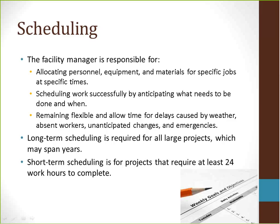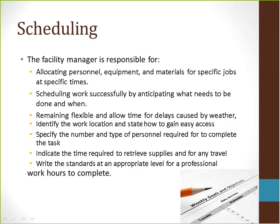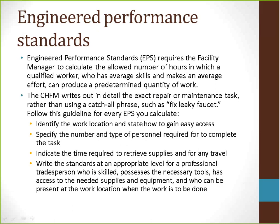Long-term scheduling is required for all large projects, which may span over a period of many years. Short-term scheduling is for projects that require at least 24 hours to complete. Engineered performance standards, or EPSs, require the facility manager to calculate the allowed number of hours in which a qualified worker who has average skills and makes an average effort can produce a predetermined quantity of work.